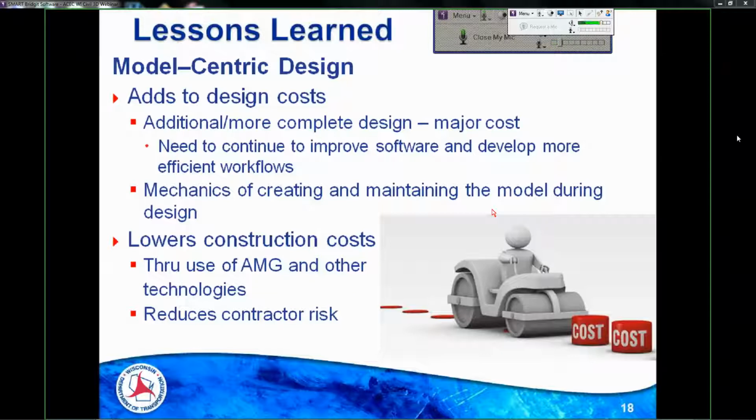The whole cross-section structure, the data structure behind our cross-sections, we don't take cross sections right from corridors. We take them from our surface models. That's a quality control measure, helping ensure that things are synchronized, right? Plan sheets matching models. Still, it's a valid perspective for a contractor to have. And there's going to be other contractors that are going to say the same thing.